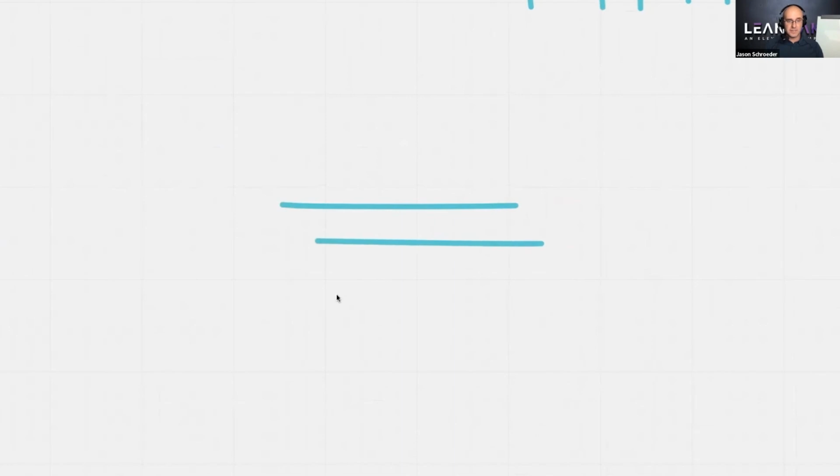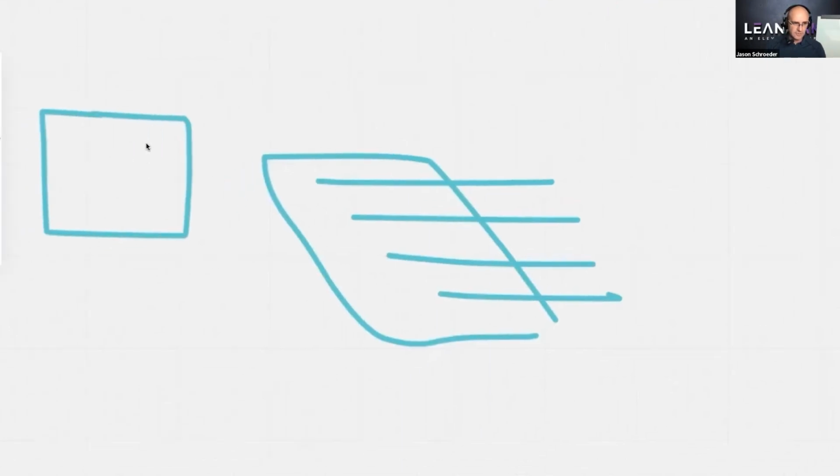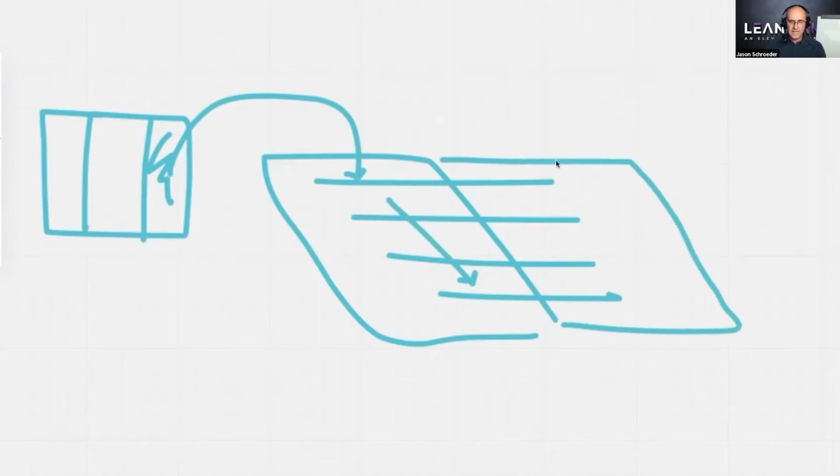Let's say you have a Takt plan that you're creating, but you only had half your trades. You would break out your zones for the building, and you would pull plan one of these areas and they become the sequence from here to here. And then you're able to optimize and get your sequence. You may, on the latter part of your schedule, have to use production rates, quantities, and historical sequences for the program type to your best knowledge, and then vet those out and refine those with a pull plan later.